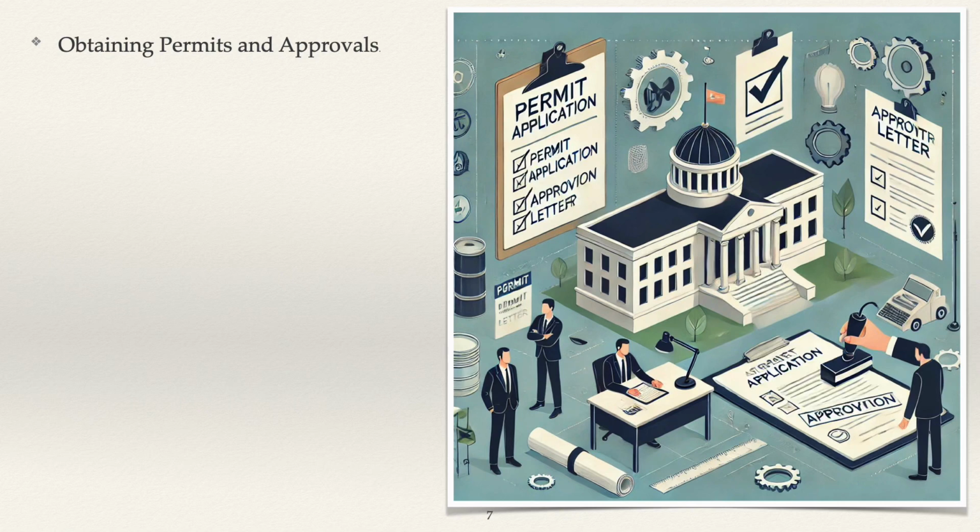D. Road, railway, and waterway crossings. Contractors must obtain permits from the relevant local authorities for crossing highways, railways, or waterways. This involves submitting detailed designs and plans for the proposed crossings. All work near these crossings must be executed in accordance with the approved plans and profiles under the supervision of the respective authorities.